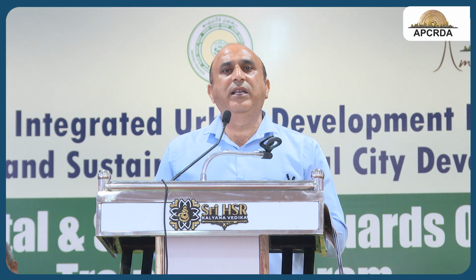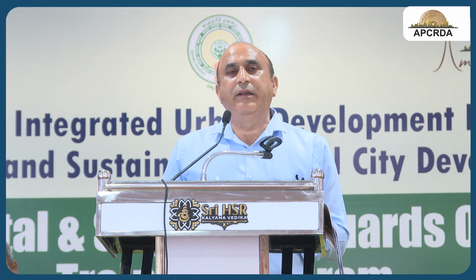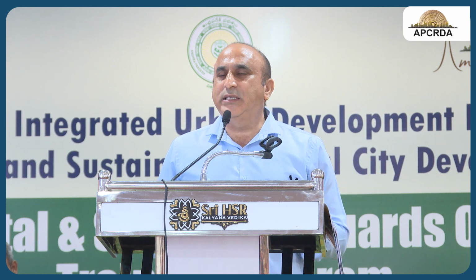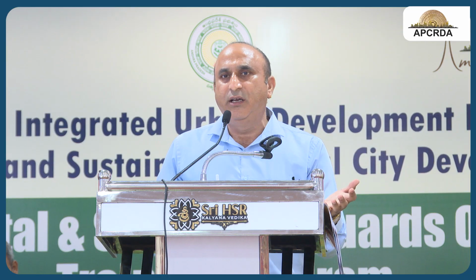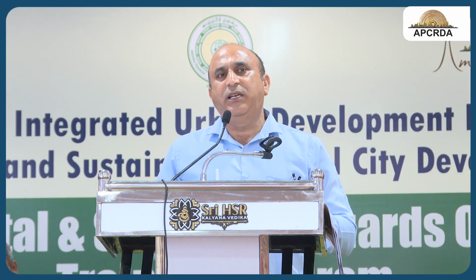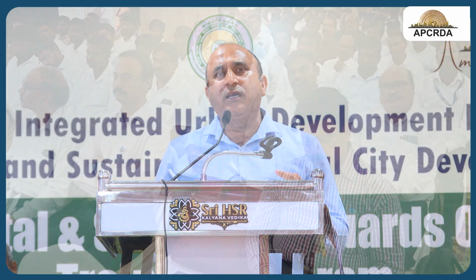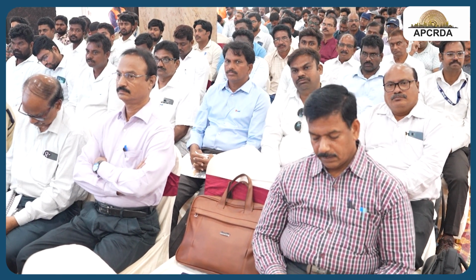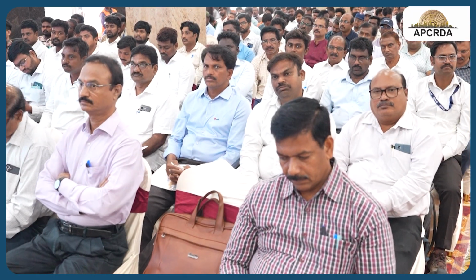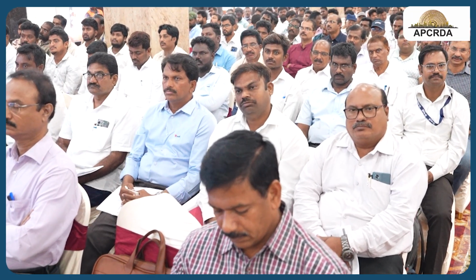Screening defines whether your project activity really requires a comprehensive, detailed EIA, or a small one, or a rapid EIA. And scoping defines what categories you need to consider, what sectors will be involved, and whether stakeholder consultation would be required or not. All those aspects are actually given in that.